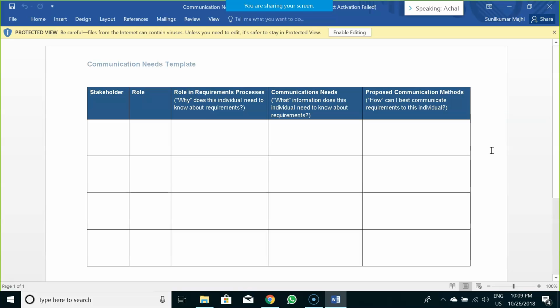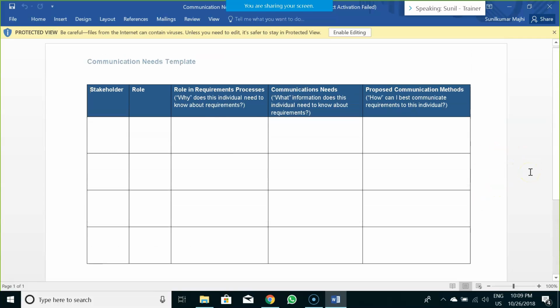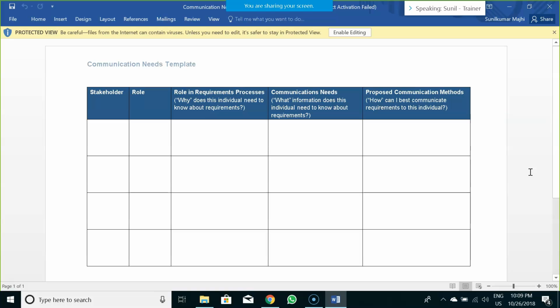See, there are two perspectives here. One perspective is if what you are developing is a product. If it is a product, it is an ongoing process, so there won't be any such change request coming up. But if you are delivering a service-based project through agile methodology, then this change request template would come into the picture. What you are assuming is a product development engagement under agile methodology. In a product development engagement, there won't be any change request as such. Rather, it would be addition of new requirements to the product backlog.